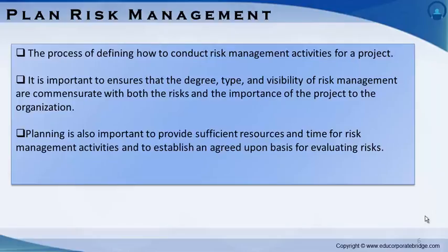The risk management plan is vital to communicate with and obtain agreement and support from all stakeholders to ensure the risk management process is supported and performed effectively over the project life cycle. Planning risk management is also important to provide sufficient resources and time for risk management activities and to establish an agreed upon basis for evaluating risks.